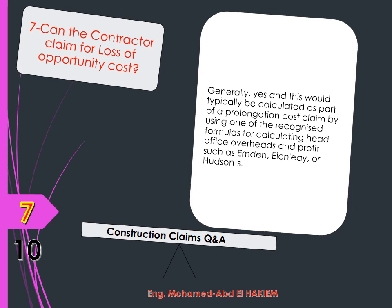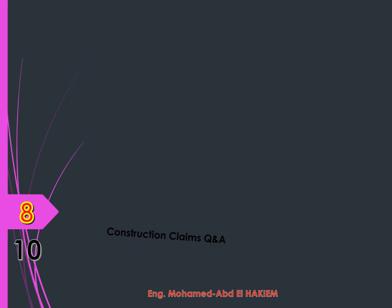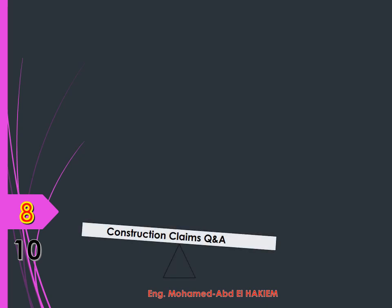Question 7: Can the contractor claim for loss of opportunity cost? Answer: Generally yes, and this would typically be calculated as part of a prolongation cost claim, under head office overheads and profit, using formulae such as Emden, Eichleay, or Hudson's. The contractor could miss taking on another potential project using his resources had he not been delayed by the employer on the current project, due to his resources being tied up for longer than foreseen.